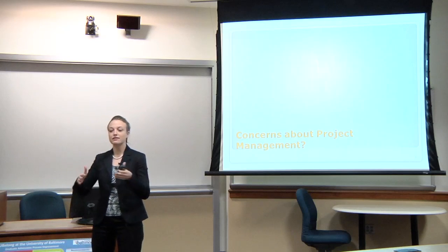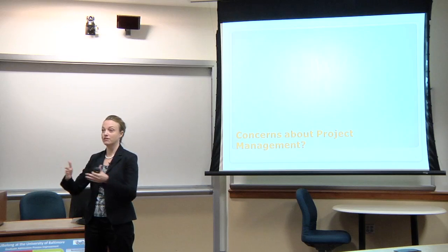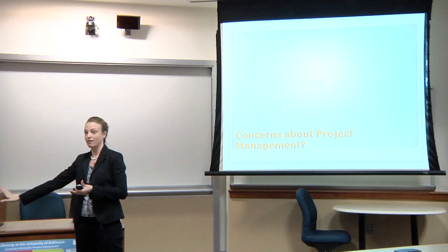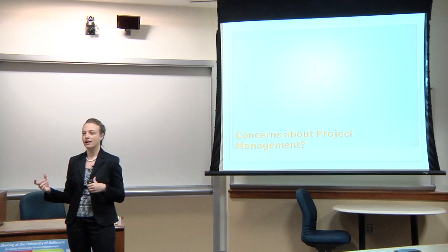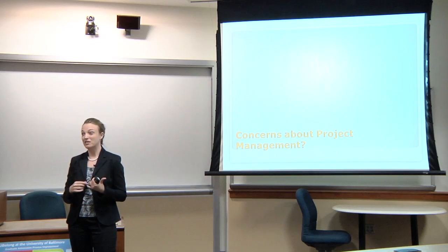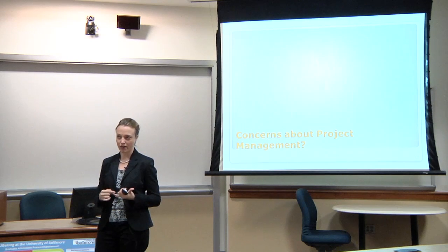So if you have 3 weeks and it ends up taking 4, you know that, okay, you're not going to be able to get this piece of the project done until you have the survey done, so it's going to push everything back a week. So maybe we need to work over, well, I guess this isn't spring semester, but we may need to, over Thanksgiving break, schedule a conference call so the team can work on a particular piece. So you want to build in anything that you have going on in the semester, like Thanksgiving, like midterms, all that kind of stuff.